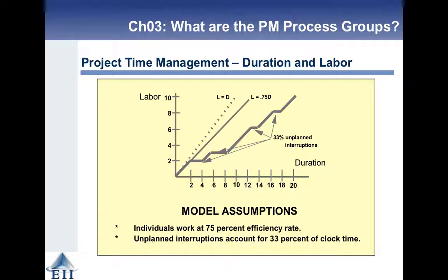People on other projects ask them for advice because they might be a subject matter expert on some particular thing. So then you've got delays. So now we've gone from 10 hours worth of work that can be done in 10 hours to 10 hours worth of work that has to be done in 20 hours. Right? So be very careful with your time management.